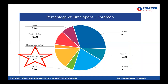The second metric is supervision time — the time spent by a direct supervisor in the field actually supervising work, which is correlated with safer, more productive work. On average, only 15% of the day is actually spent on supervision industry-wide. There is definitely a lot to be improved.